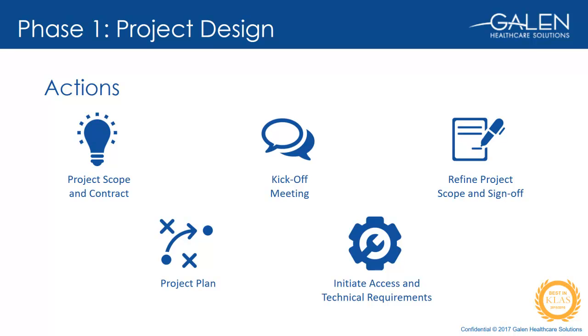The kickoff call is also a great time to make sure the process of providing access to the databases and systems for the migration team has started. These processes need to be started as soon as possible because it often takes longer than expected, and the actual migration work can only begin after system access has been granted.